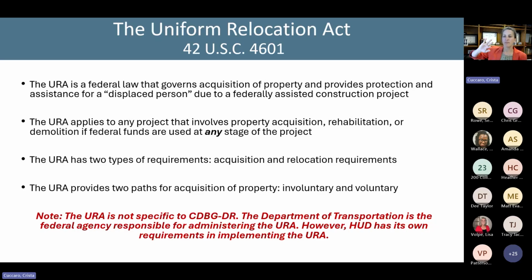We also have these relocation requirements that arise when someone, an individual or a business, is going to be displaced from property due to a project. And that displacement could be temporary or it could be permanent. Depending on the nature of the displacement, there are additional and different requirements that apply. So that's kind of the gist of the URA, right? We're providing protection for people whose property is being acquired, and then people who are being displaced by these federally assisted projects.